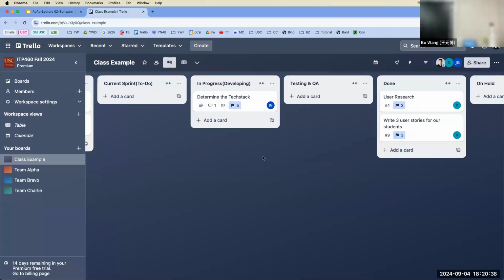We always talk about what went right and what went wrong. John may say, hey, I thought it was a 5-point task, it's actually a 13-point task for me. Or John may say, I only finished the front end research part, not the back end research. Then I would say, next time we hit this, break it down to 2 tasks.